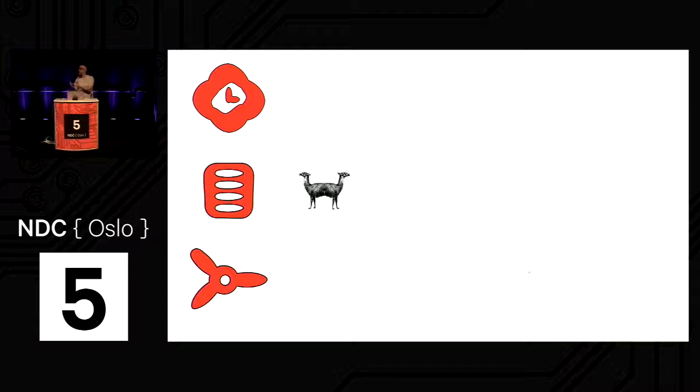The next one is queues themselves. You've got different types of queues. This animal is from Dr. Dolittle. It's called a push me, pull you, if you've come across these before. This is the sort of cyclical queue where a developer finishes a piece of work, puts it into the queue for the QAs to have a look at. The QAs say it's broken, and have to put it back into the queue for the developers to look at. You get these cycles in your organization. And the third one is synchronization. I have to wait on another team before I can carry on.